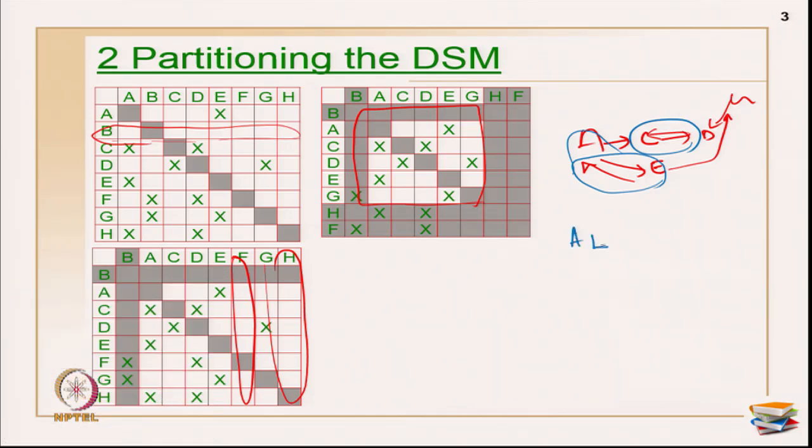Okay. So, I have two loops. AE is one loop and CED is another loop, and then I have activity G. After AE I have activity G. So, primarily I have a block of cycle length 2, and then I have one more activity also.